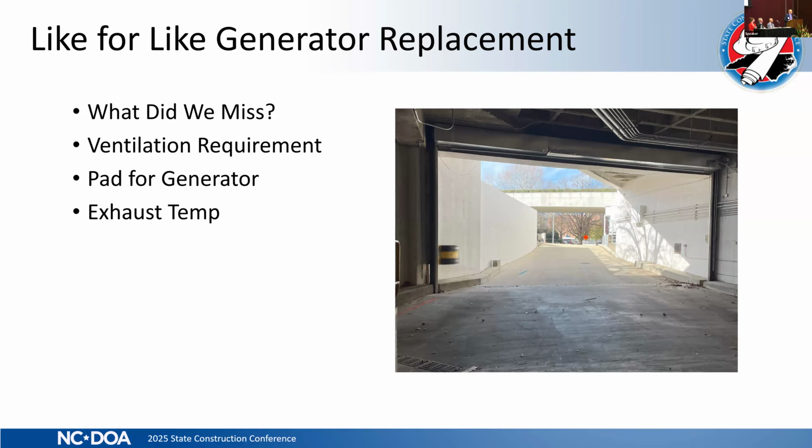Power outages don't usually get scheduled, and they don't always happen during normal hours when the loading dock door is up. And that loading dock door was a solid door. When it's down, it significantly reduces the amount of airflow. So if you look at this pretty closely, you can see this with the door up.